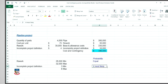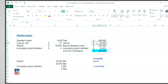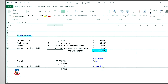So using the spreadsheet software, it is now possible for me to go in and make a change to one of these variables and then see the outcome. For example, it is easy to see what would happen if I now change rework from $30,000 to $28,000. I can also change contingency from say $4 to now $7. However, it becomes a bit more challenging if I wanted to change both variables simultaneously.